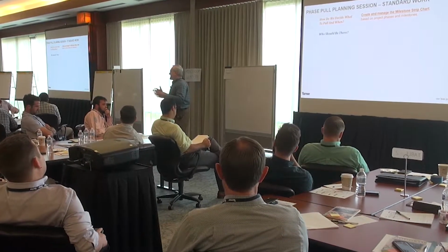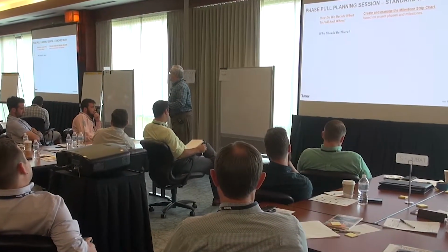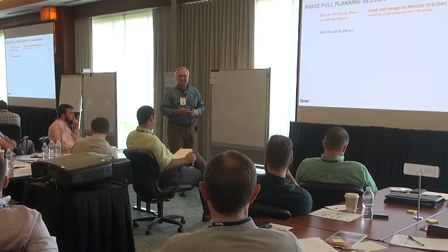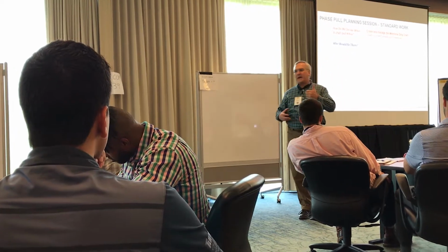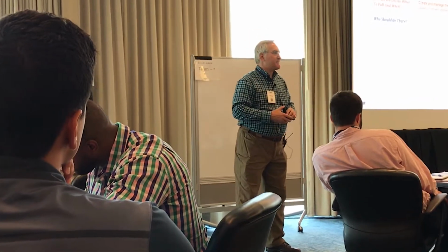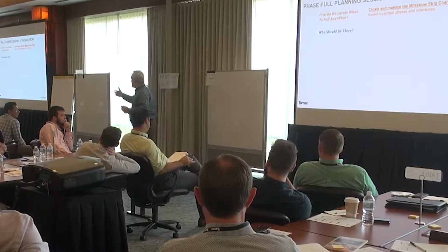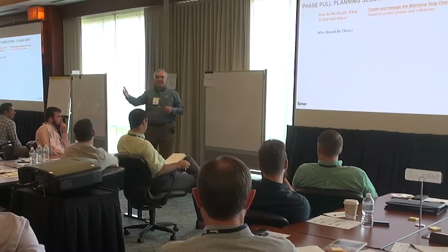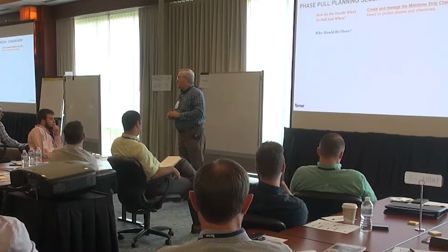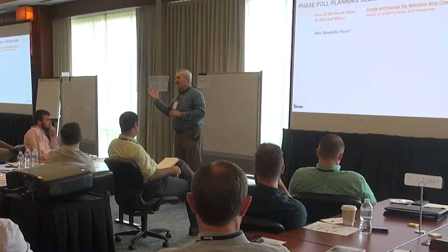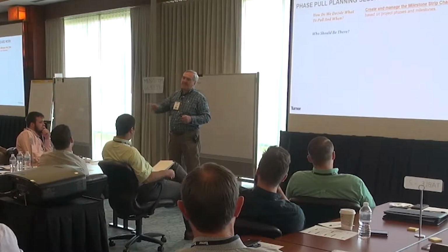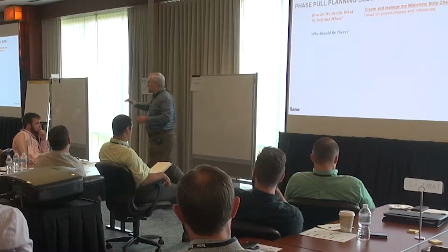If you're doing mass excavation and grading, definitely you have to have the grader there, right? You have to have the excavator, underground utility people, right? Who are other people that might need to be in a pull plan if you're doing the opening up of the job site? Utilities, thank you. You should have your utility company, right? Your fencing contractor might be a good person with respect to coordinating all that action, right? You may have the customer with respect to their specific needs if it's an existing site, because they want to make sure the patients can still get into the emergency room or the students can still get in the classroom, right?